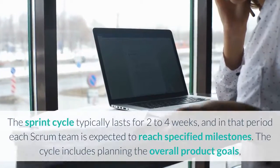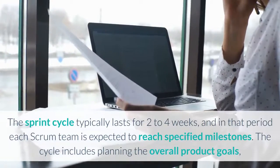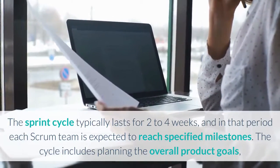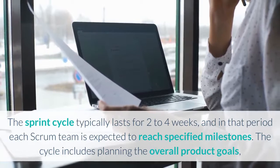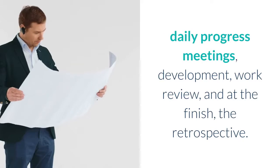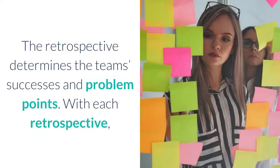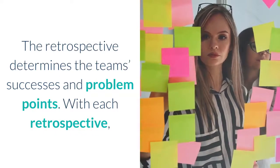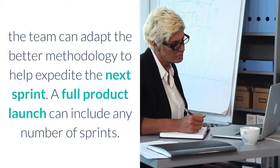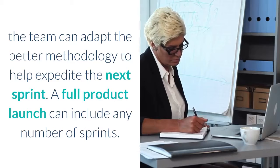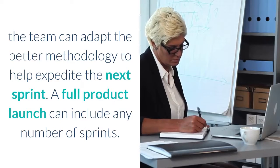The sprint cycle typically lasts for two to four weeks, and in that period each Scrum team is expected to reach specified milestones. The cycle includes planning the overall product goals, daily progress meetings, development, work review, and at the finish, the retrospective. The retrospective determines the team's successes and problem points. With each retrospective, the team can adapt a better methodology to help expedite the next sprint. A full product launch can include any number of sprints.